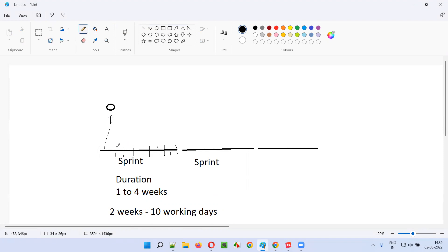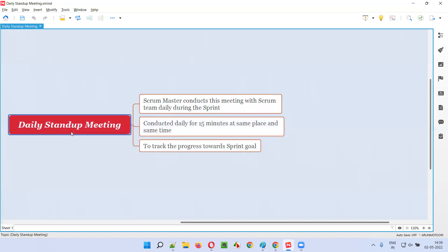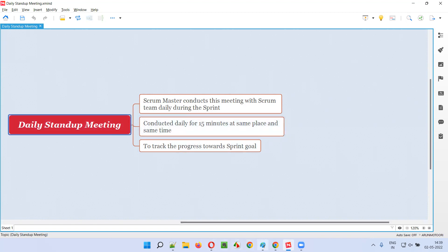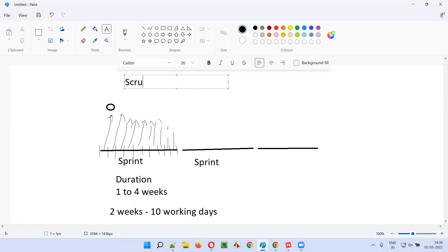Every day, a meeting will be conducted just for 15 minutes at the same time and same place. That meeting is called the daily stand up meeting — it's also called the daily scrum meeting. This meeting is conducted by a role known as the scrum master.